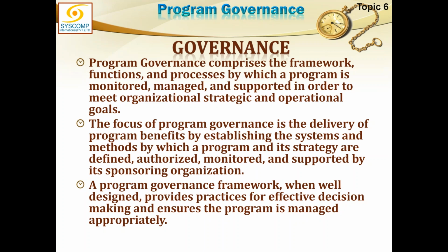What should be considered by the program managers to run a program, what they are supposed to be reporting upstairs, and what the key performance indicators are, and how the key performance indicators can be established, is all given in the program governance. But program governance will not indicate exactly the KPIs. KPIs will have to be established and agreed with the top level management.